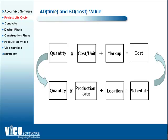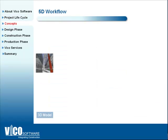When you have a building information model as a general contractor, you have access to a lot more information about the project. You have access to quantities broken down by locations, giving you the ability to get a better handle on the subcontractor's scope and bid — negotiating not about scope and quantities, but just the unit cost and the markup. Or when looking at the schedule, negotiate about production rate, how many people they'll have on site and when, as opposed to start and end dates which are very hard to predict without this detailed breakdown. The 5D technology gives you an information matrix to generate all quantities from the model, break them down by location, and create an accurate estimate and schedule throughout the pre-construction phase.